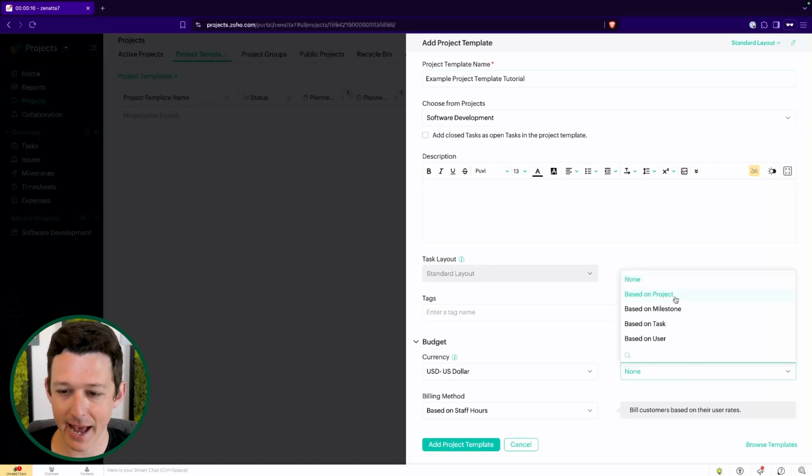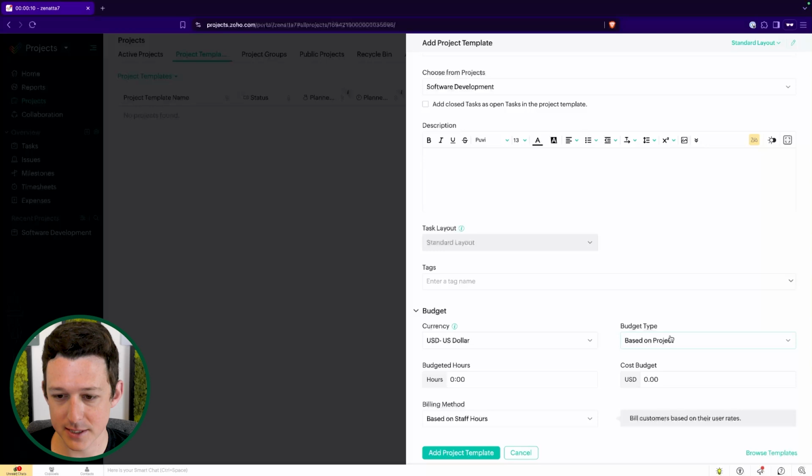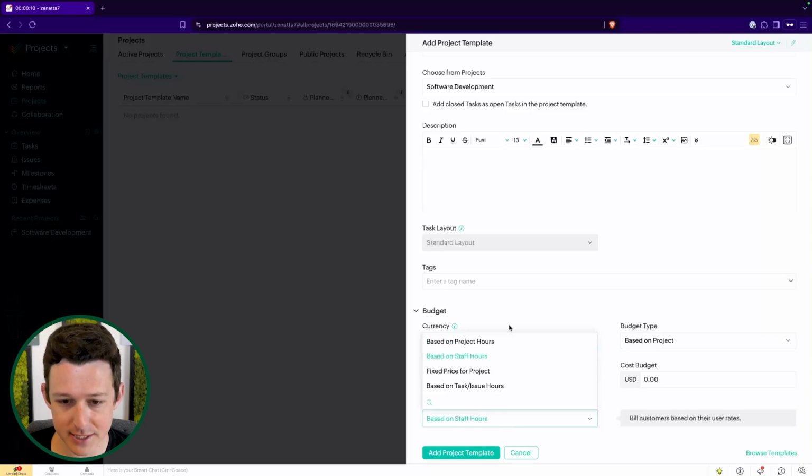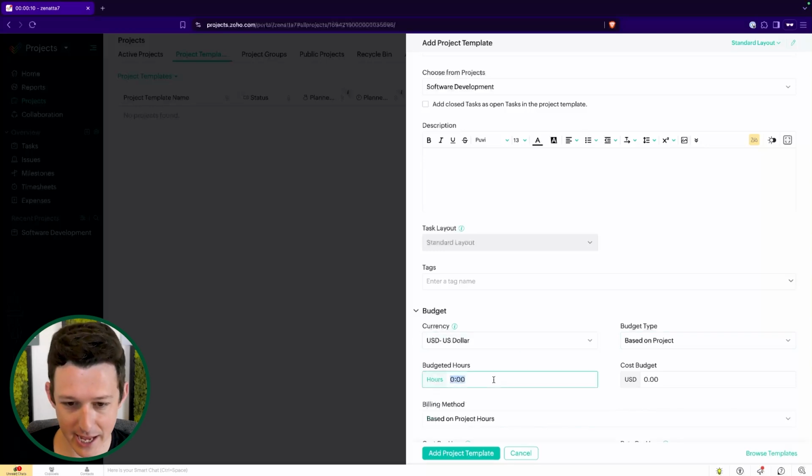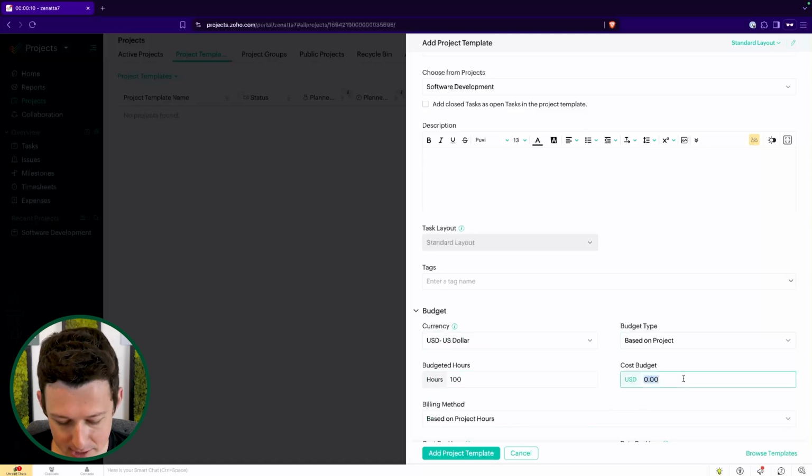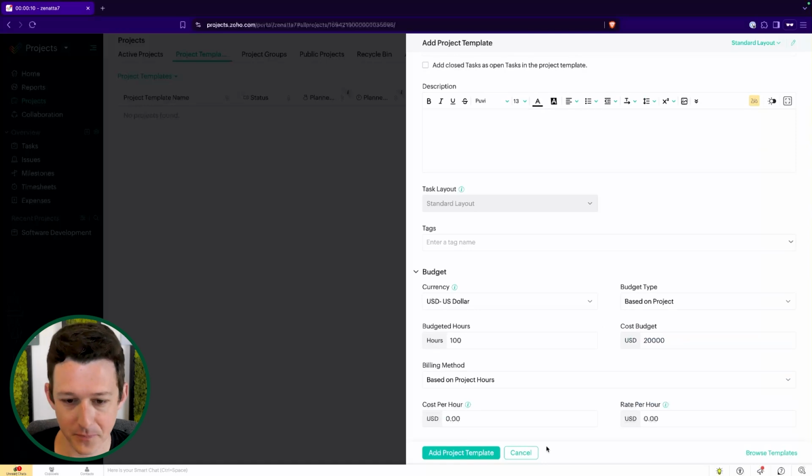I'm going to set this as a billing type. We're going to say it's billing based on project. Let's say we want to base it on our project hours. So our budgeted hours, let's say, is 100 and our cost budget is 20,000 or something, right? So our rate per hour would then be 200.